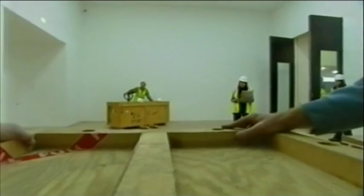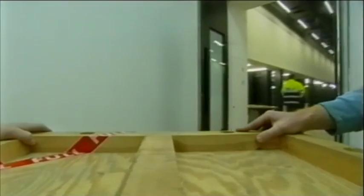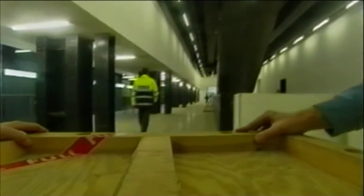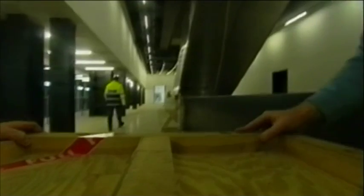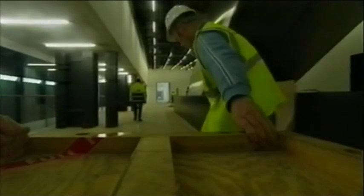As the interior fills out with walls and floors, balconies and concourses, the Tate team looks ahead to completing the building in 1999 for a target opening date in May 2000. But when the building is finally completed and handed over, there will still be the task of filling 84 rooms with several hundred complex works of art. That is the task that now faces six teams of art handlers, trying to do in 4 months what was originally scheduled for 7. It's touch and go as to whether they'll complete it in time for a royal opening.